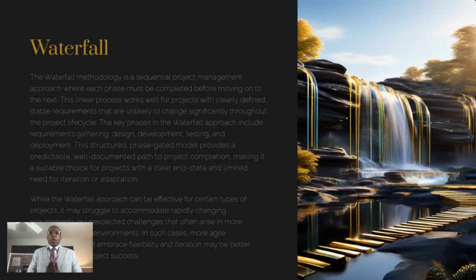So meaning, let's look at initiating. So we start at initiating, then we move to planning, and then from planning we move on, but each one of these has a stage gate. Maybe for initiating, in order to move into the planning section, you need to have the project charter and your stakeholder register authorized. I'm just using these examples because different organizations have different requirements or different artifacts that need to be in place before you can move on to the next stage gate.